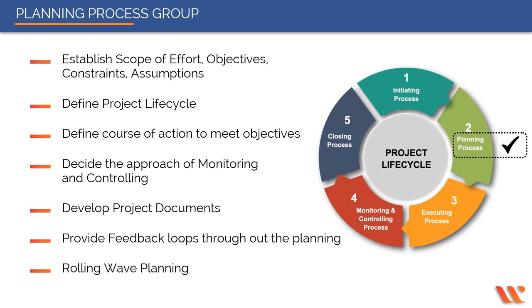You will also develop a resource plan and communication plan that is appropriate for your stakeholders. This process follows what is called rolling wave planning. What this means is that in the planning phase, you will make initial plans. As the project progresses and the details become clearer, these plans will be amended to factor these in, make the plans more detailed and elaborate, and make it more accurate and achievable.